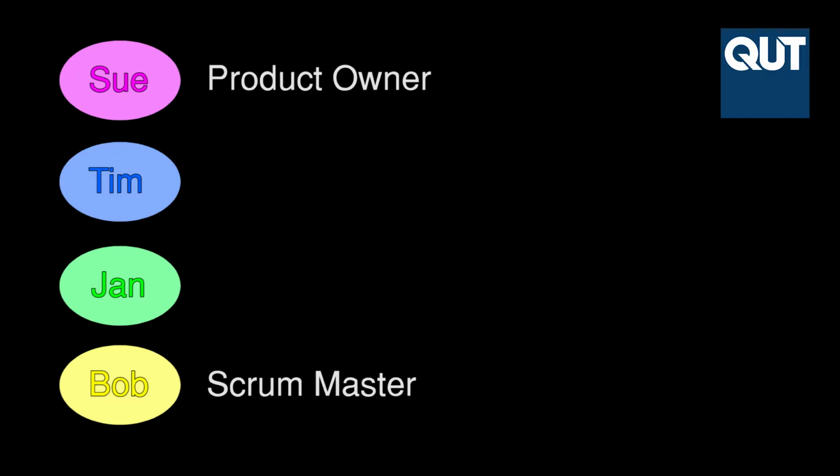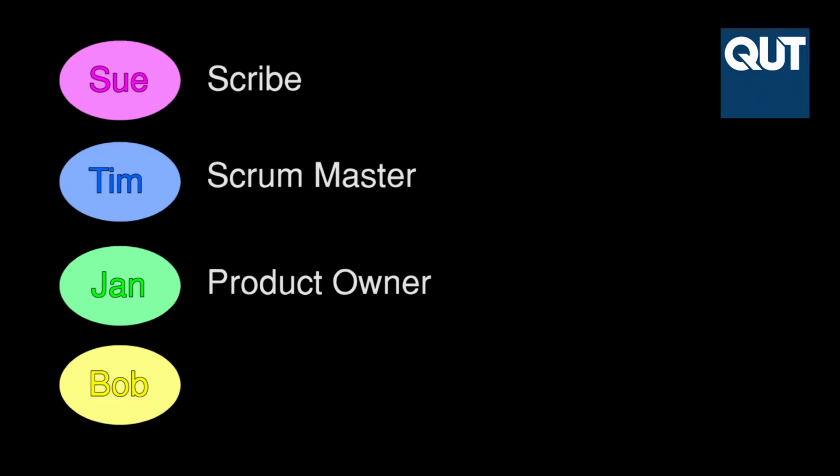You should also have someone who makes a general record of what tasks are decided on, how long tasks are estimated to take, and any important comments that are made during the Scrum meeting. This person, commonly called a scribe, may, you guessed it, be part of your team as well. Everyone should be expected to participate in these roles where necessary, even rotating them as appropriate. Again, not taking this seriously means you won't get anything out of it.